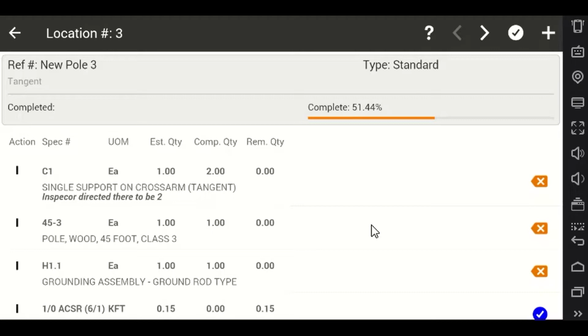Another thing that may be happening here is some of our owners like to participate with the work groups and do inspections. We do have an inspection module for the owner or a third-party inspection group, so that as soon as units are marked as complete by the work group, then they're sent to the inspector to be validated. Once the inspector validates them, they're sent forward within UnitsPro to billing. If they're rejected, they come back. They'll turn red in here with a message for the foreman to resolve.